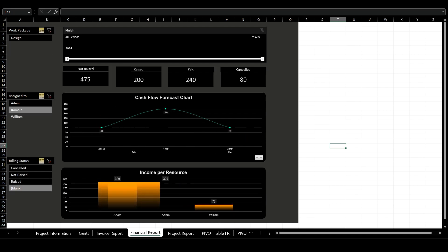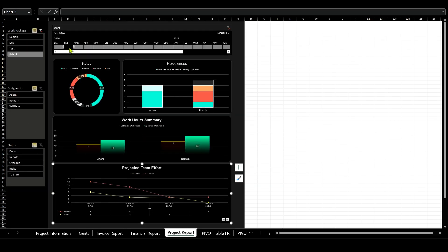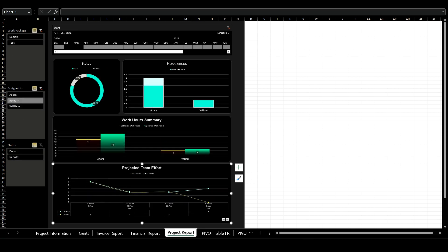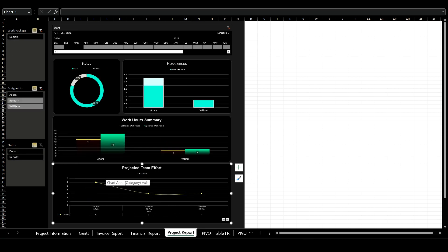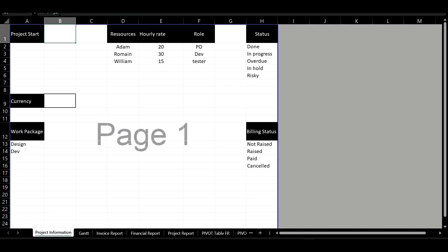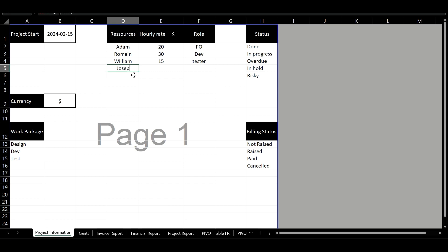As an entrepreneur, here's how I effectively manage my projects, resources, and finances using a comprehensive project management template. Firstly, I initiate the process by outlining the basic project information, including the start date, currency, work package, team members, their roles, and their hourly rates.